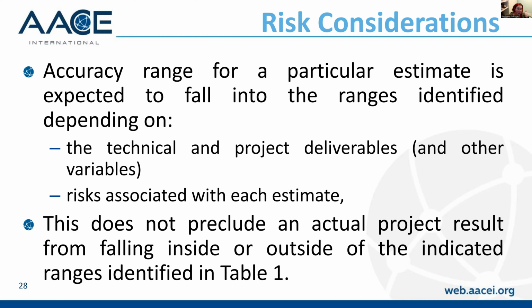Currency exchange, assumptions, reference data, all of that came into play and was rather interesting. Again, if we document everything in the basis of estimate, at the end of the day, somebody will be able to read what we've done and understand why we did it, and be able to understand: was this accurate at the time, or were we out to lunch when we put those numbers together?